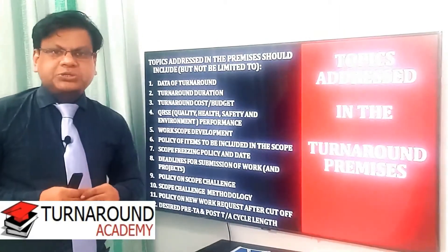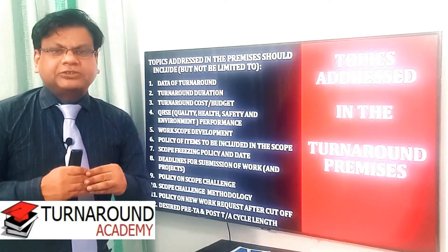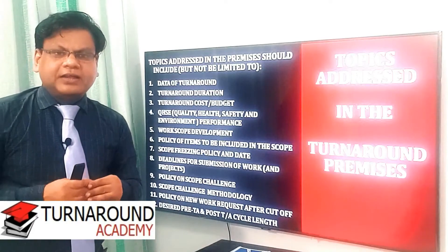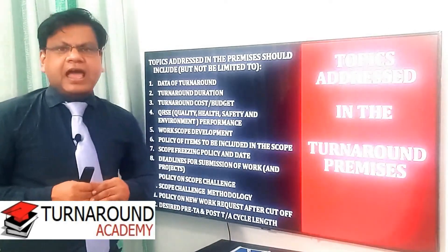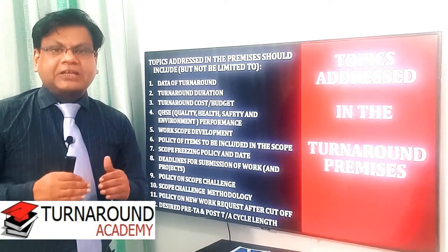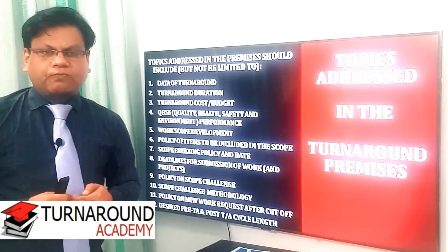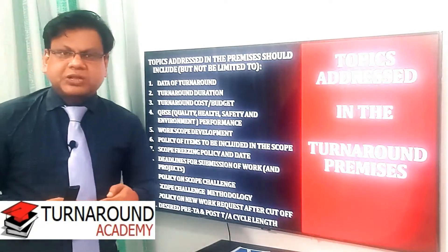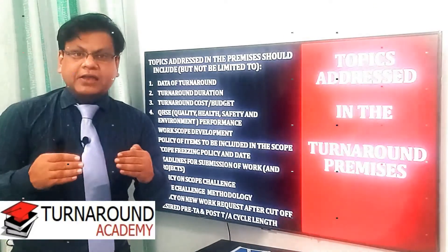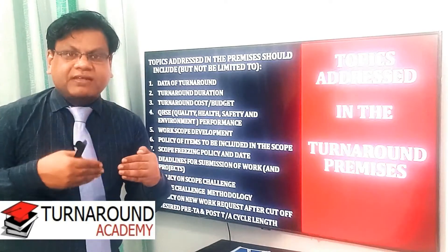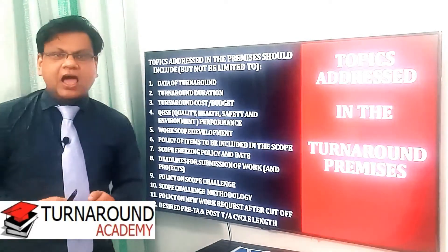Number eleven, policy of new work requests after the cutoff date — guidelines for what equipment or work requests need to be included in the turnaround after the cutoff date. Number twelve, pre-TA and post-TA cycle length — management provides guidelines on how long the pre-turnaround phase and post-turnaround phase will be. These twelve items are the minimum to consider; you may amend, delete, or add more points as per project requirements. Watch the entire video since all activities have a sequence.